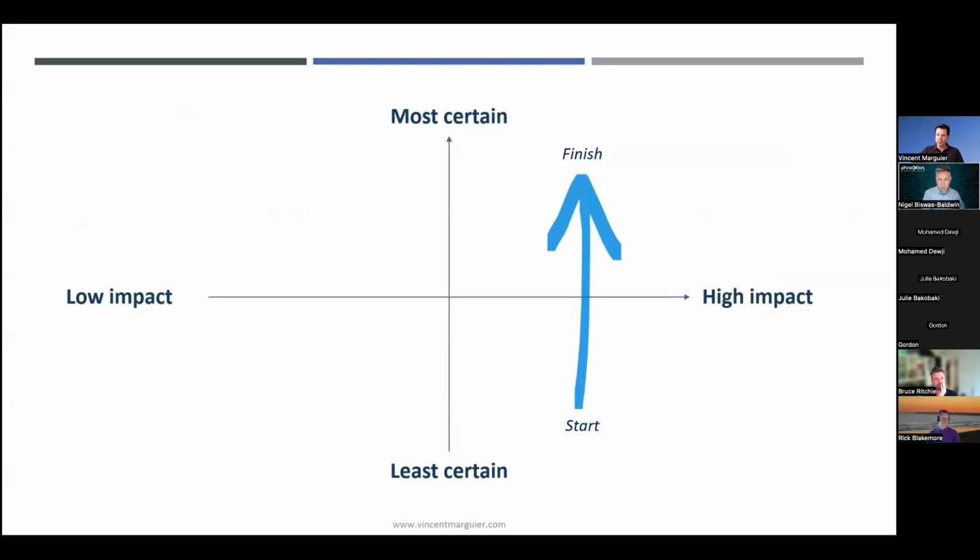Their expertise will contribute to establishing assumptions with a higher certainty. So it is the role of the project manager to make sure the team focuses on assumptions with the highest uncertainty first, to clear them up until they move into something more certain and more impactful.